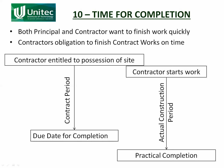If the contractor, in actuality, takes longer than what was required, then he is technically in breach of the contract — he has not fulfilled his obligations. One of the contractor's obligations is to build the project works in a specific period of time, as set out in the contract period, which runs from when they are entitled to possession of the site through to the due date for completion.